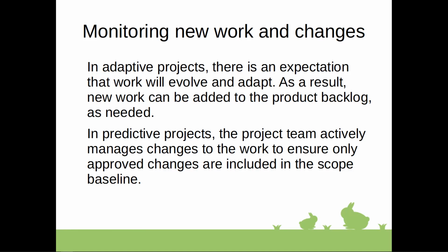And one way to do this is for the project manager to introduce a change control board and to work with the change requester to review the change requests and guide the change request through a controlled change process, to approve certain changes and reject other ones, basically in an attempt to reach the project goal in an accepted manner.